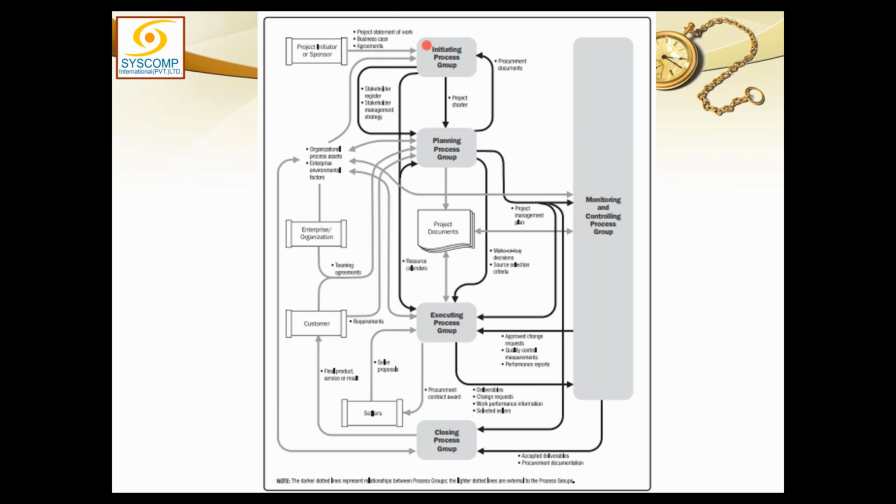You're right, but you should not call it a request, because even before he requests for the proposals, the RFP, even before those procurement documents are created, the very first thing he creates is a project statement of work. And that is created when the customer feels that this job he cannot do himself and he has to outsource it.